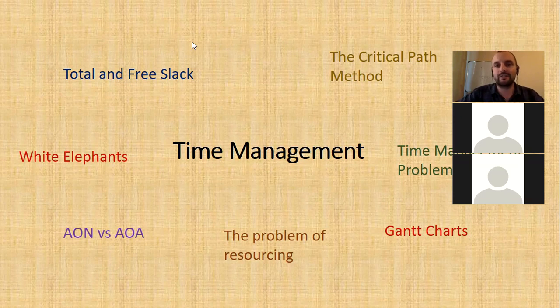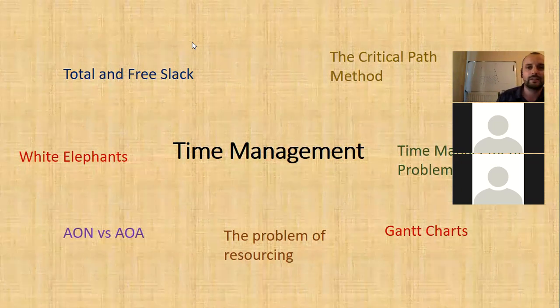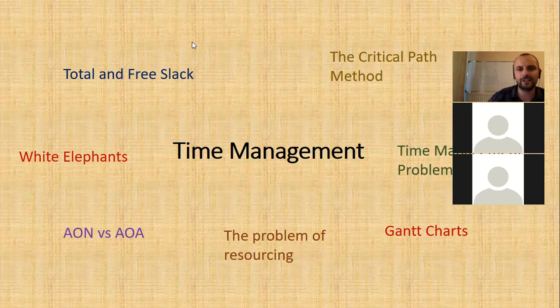So that's a white elephant. And because he's trying to do it at low cost and he doesn't care about getting money from tenants, that means he doesn't care how long it takes to finish. So he will rather do it at low cost, long time, than reasonable cost, short amount of time. So white elephants, when there's government interference and government stimulation and grant money, tend to take a really long time to complete. But the KRG has done a good job of trying to eliminate that with the investment board, which is something I talk about, I think, in the same lecture. So, yeah, that's time management.